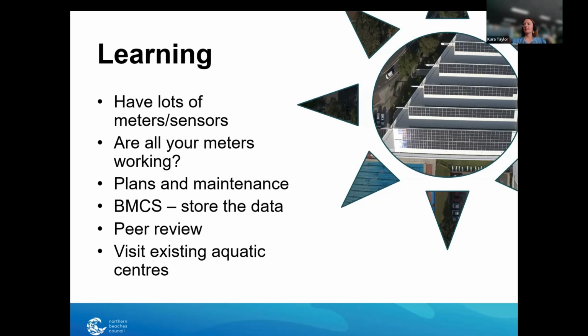And in our initial build, we missed out on a few opportunities. So if you are doing a larger scale refurbishment, don't not include stuff, because some of it we can't build back in now from the original plan for our centre. Consider future electricity demand. You're going to have EVs on site, and don't forget to consider the impact on your electricity bill. You've probably got an allowable load variance. Pretty big centre. Just make sure what impact that's going to have on there. And that's pretty much for us. Like I said, happy to answer any questions as anyone's going through this. I've learnt heaps and I'm still learning.